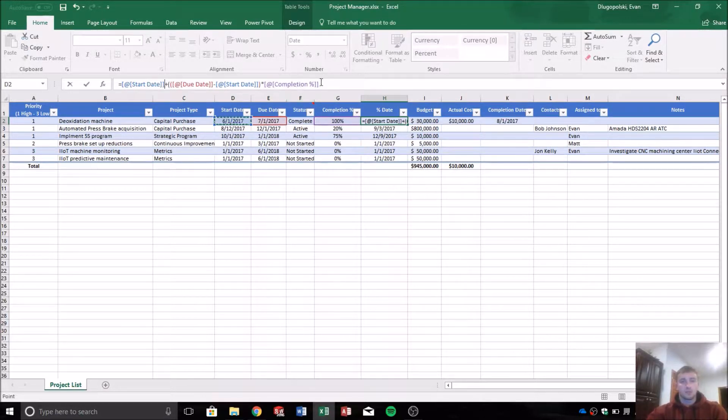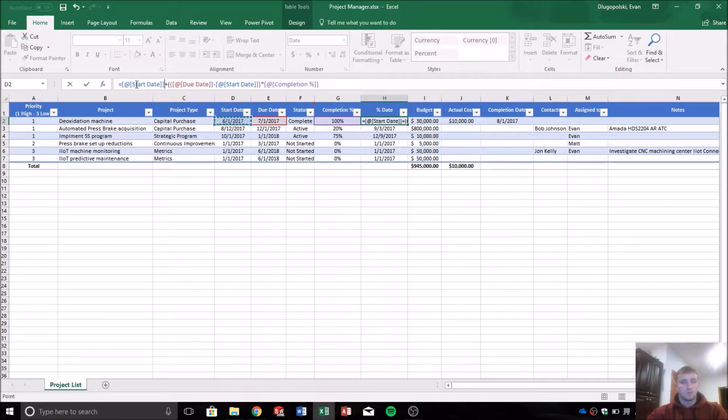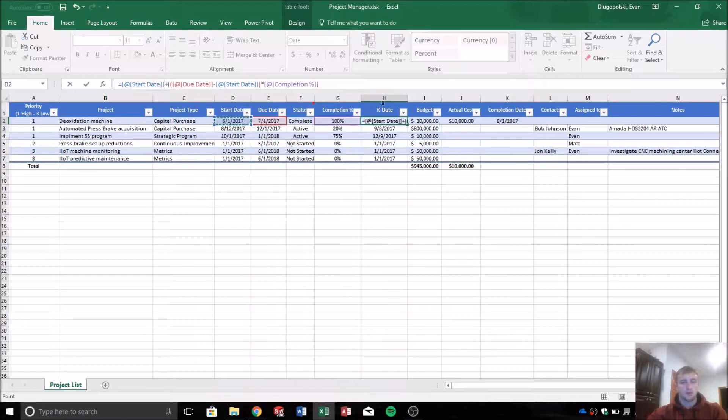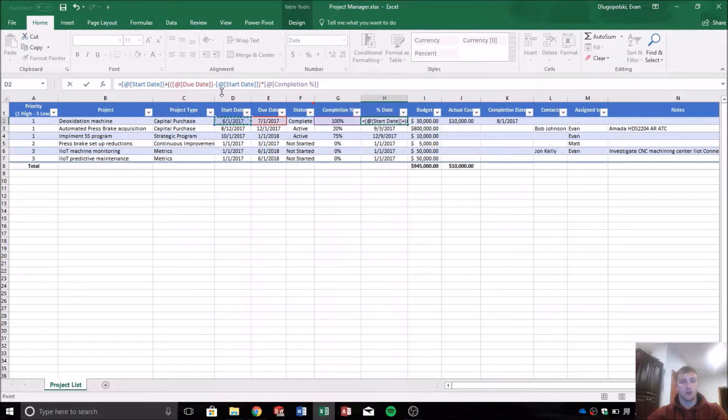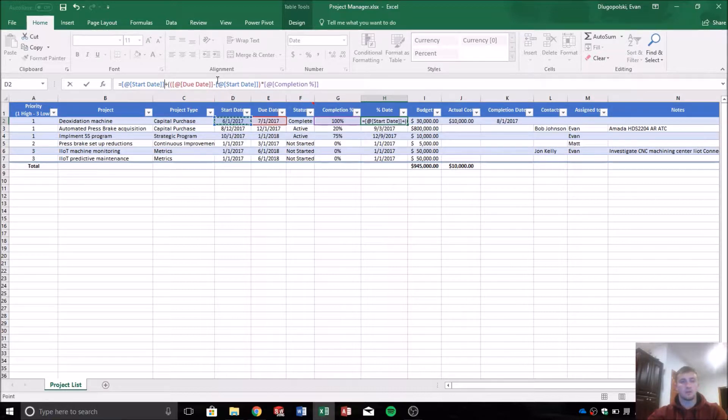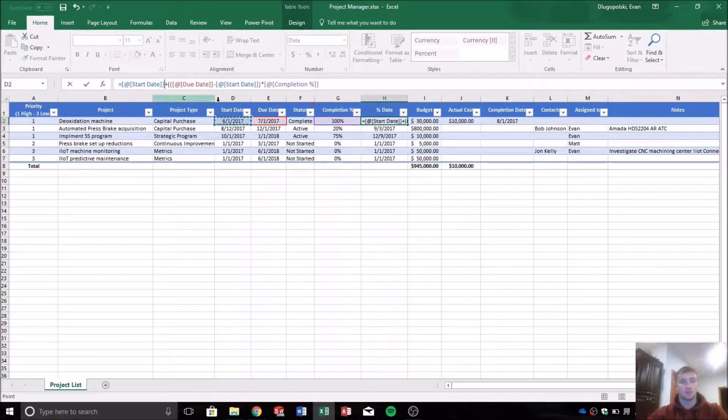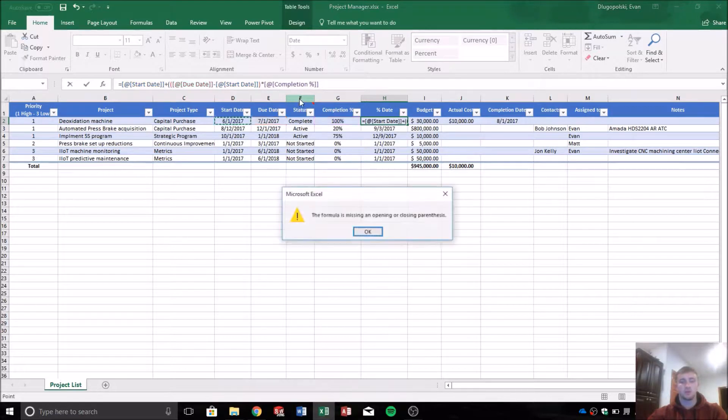So now it's a little easier to understand in our formula here. We can see that this percentage date value is calculated by taking the start date plus the due date minus the start date, or the difference between the due date and the start date, or the length of time that the project has to be completed, times the completion percentage.